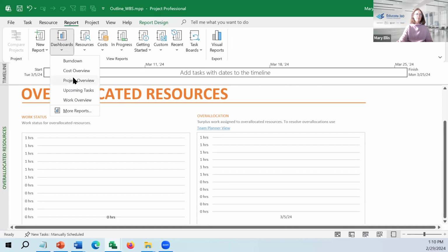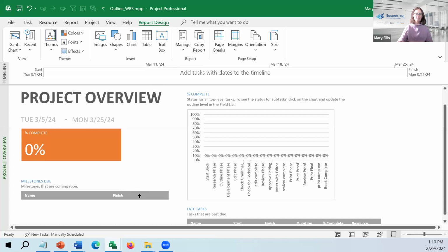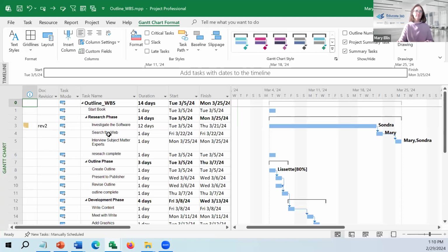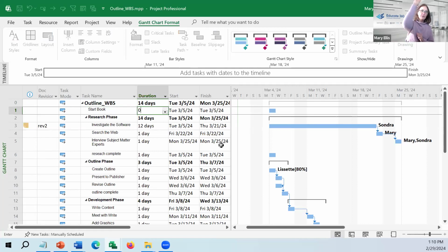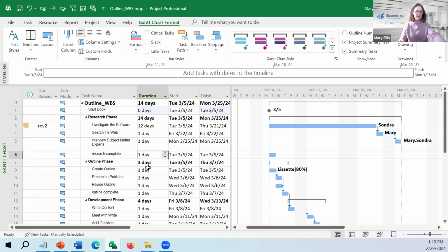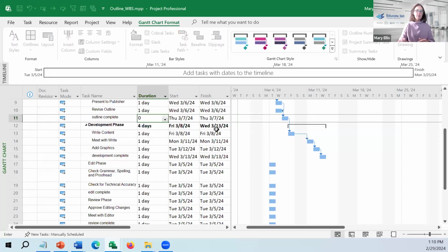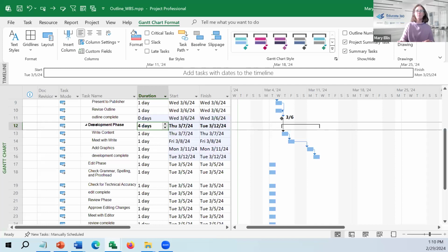dashboard. This is project overview. And a milestone. A milestone is a diamond out on the Gantt because you make that a zero duration. Beautiful. A zero duration is a milestone. And you should pepper through your file and get those, yeah, it's complete. Give them a milestone so they know what day will that be complete on.